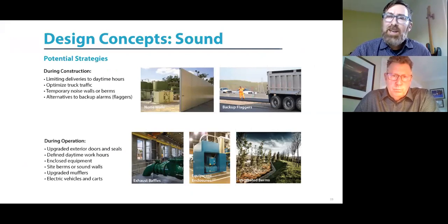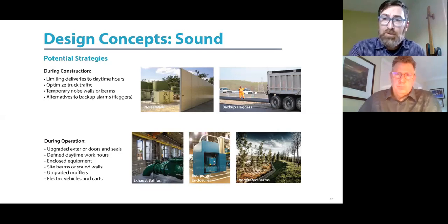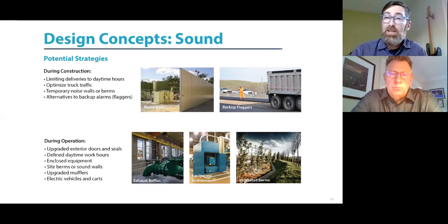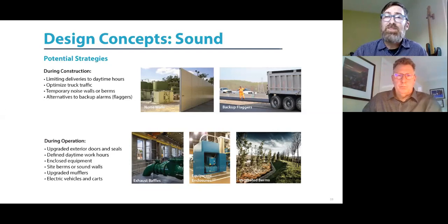and that high pitch frequency is often harder to mitigate and more annoying for folks. Low frequencies are easier to handle, and things like berms are good for that. But for things like backup alarms, we'll have to work with the contractor to see what kind of devices they've used and what alternatives they're willing to do. And we know that backup flaggers is not a fail-safe for safety, but it is for the sound aspect.